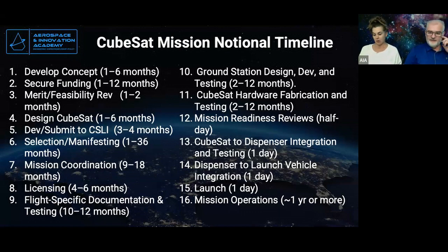Right. And on our first mission, we would have potentially lost our ride had it not been delayed several times, because we had some difficulty getting our radio license. So that became very evident to me. And I want to encourage all of you, if you're working on your CubeSat, get to work on your paperwork for your licenses as soon as you're accepted, I would say, right? As early as possible. Yes.